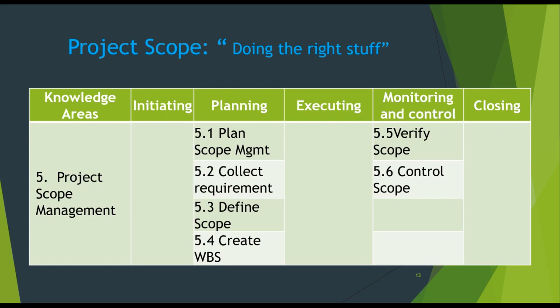Project scope — doing the right stuff — is the work that is included in the project. The process is all about making sure that everyone concerned with the project is clear about what the project is aimed at and what it includes. Scope changes alter mostly the project itself, so it is essential that the project boundaries are well defined from the beginning and are carefully monitored. Changes can occur at any point in time, but even the simplest changes can have a lasting result on the outcome. The project scope management includes six processes: plan scope management, collect requirements, define the scope, create work breakdown structure, verify or validate the scope, and control the scope.